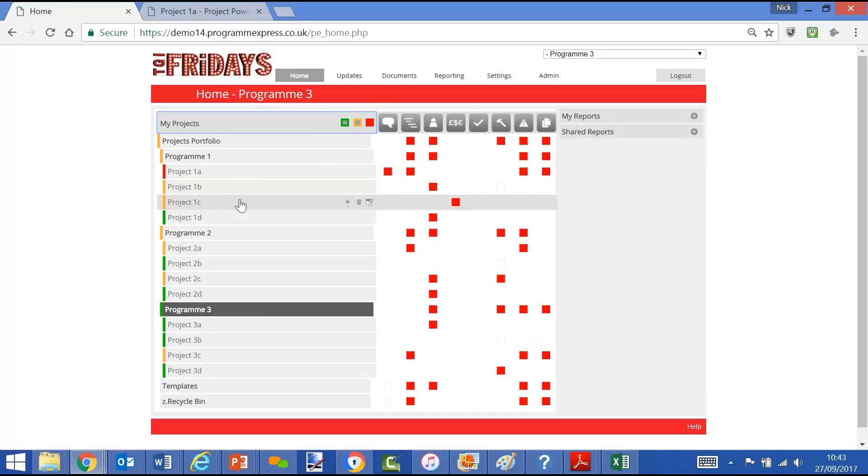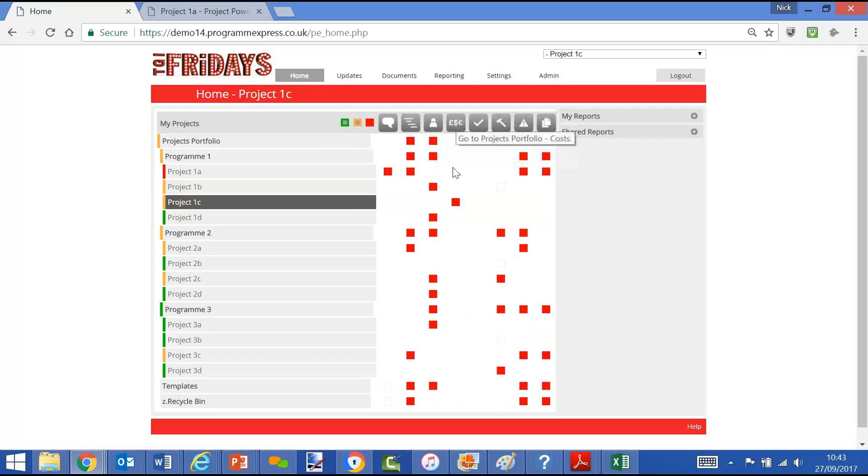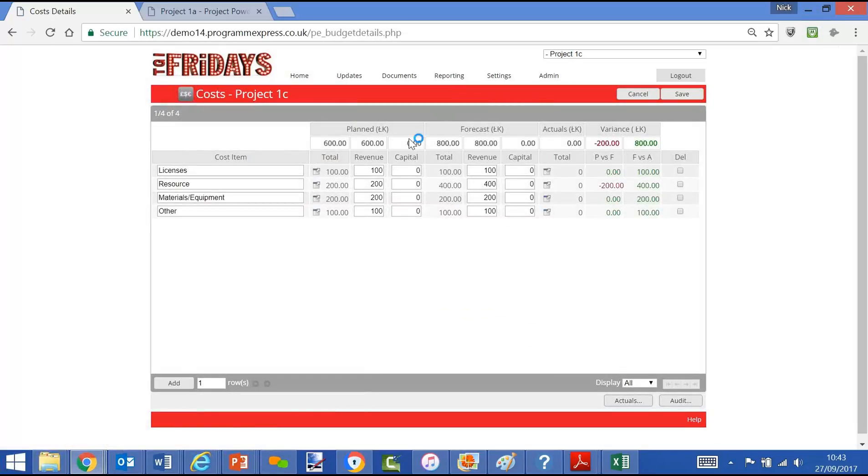As an example, we can click on Project 1C. We can see that there's a red there in terms of cost. We can drill down and we can see the forecast cost against the plan, which is out of tolerance and therefore red status.